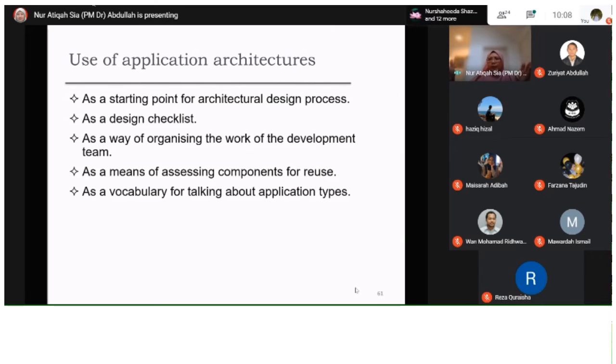Okay, so definition untuk critical path tu adalah the longest path. Bermaksud the longest path, but this is the shortest time for you to complete. Maksud you dah identify what will be the critical component inside the whole process of development. Contoh you kira adalah perlukan lebih kurang 60 hari. So 60 hari itu adalah untuk nak siapkan projek tersebut. That will be your critical path tu. Bermaksud you kena ada kira sedikit untuk contingency, 60 hari tu is a must untuk you habiskan satu projek tersebut.